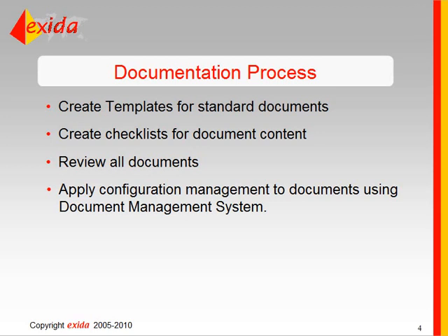And in addition, this also is associated with control of documents. If someone wants to change a requirement for a product midway through development, they shouldn't be allowed to just go through and change the requirement. They need to follow a process where the change is reviewed, the impact is studied, and it's approved. And so the control and change of documents is also controlled by this configuration management process and the document management system.